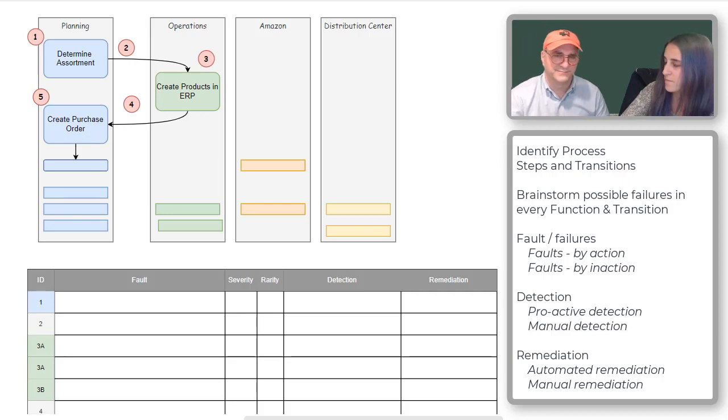Exactly. So one example of that would be linking your project management software to your Slack and/or communication channel to alert the other team when you have changed the status of an item. That's interesting. This is a kind of modern way to do this. Slack is an interesting intergroup communication. You could actually have a channel used for nothing but this handoff communication. Yep, exactly. And then you would have a record of all the communication that occurred that even new people could see. Yep, and it can link to other software, for example, Monday, a project management software, and have it auto alert when something is updated. And then if there's no action in a certain amount of time, you might escalate.